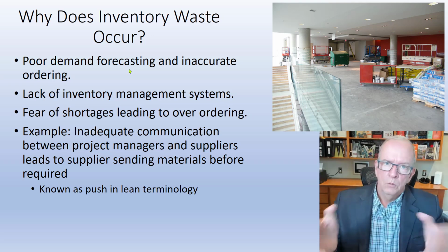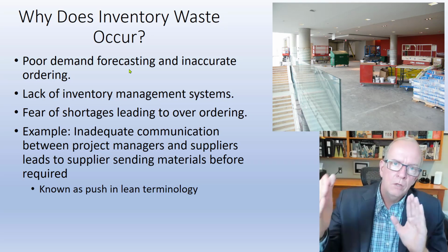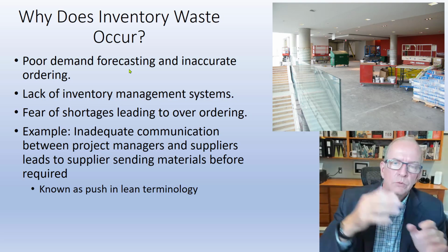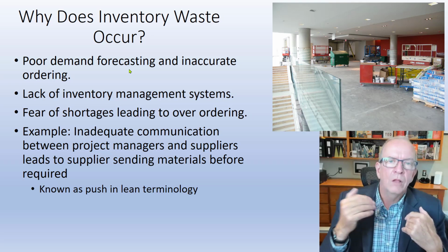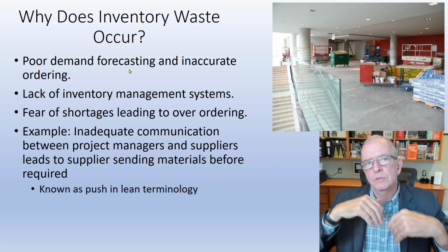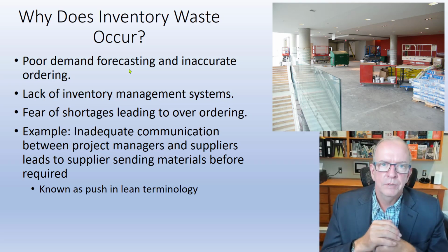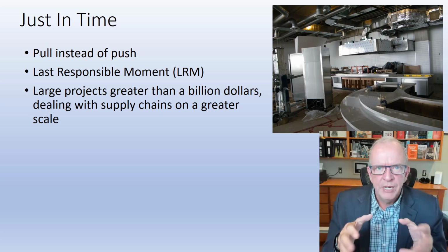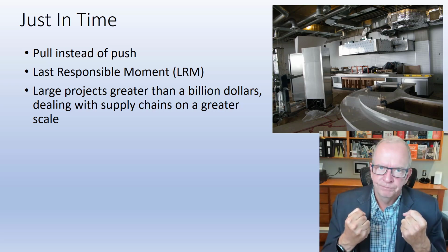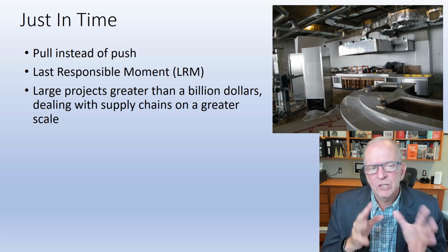Suppliers say, we've got this, it's coming, but we're not ready. Or we're delaying this coming till we need it. We're making you deliver it in smaller deliveries. We've let you know this ahead of time. We're not all of a sudden telling you at the back end, because then that puts your suppliers, that puts your subcontractors in a negative position. It's a collaborative process. Just in time. So push is just pushing it out. Just in time is pulling, as I said. So you're pulling it to the site. Now in construction, a lot of times, I actually like this lean term.